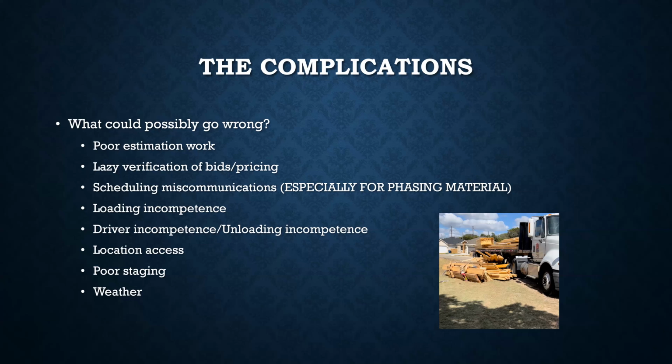The next thing would be lazy verification of bids and pricing. I gave an example in the materials estimating class about that 84 Lumber bid being sent back with incorrect materials on it, like quantities, things added in, things multiplied. When you get that stuff back, you have to verify and make sure things are correct. If you're lazy and you just say, all right, they sent it back, looks good to me, I'll pay that, boom, good to go, then that's going to be a complication.